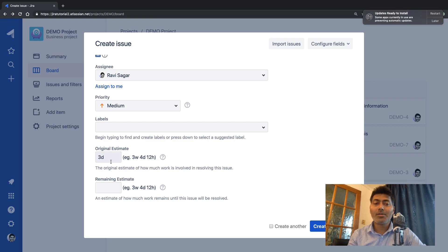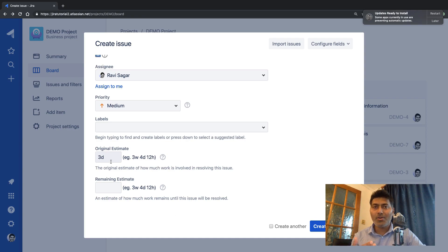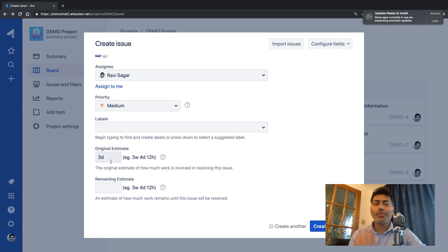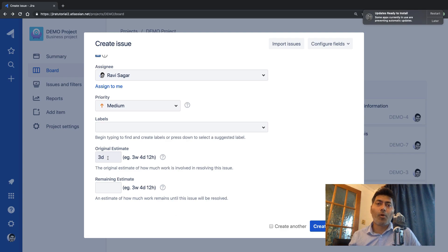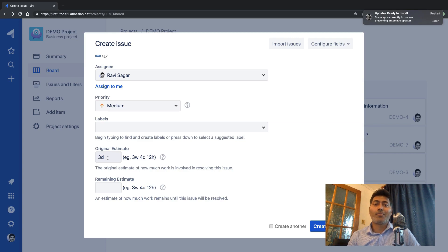For example, if you are designing a new template for proposals, you can mention that this activity should ideally take three days — either based on your own estimate or discussed with the assignee. The purpose of this field is to measure the time an activity will actually take, so the assignee can start logging their effort, like two days or three hours. If you don't find this field on your project, ask your Jira administrator — we will also be covering Jira admin activities in this video series.